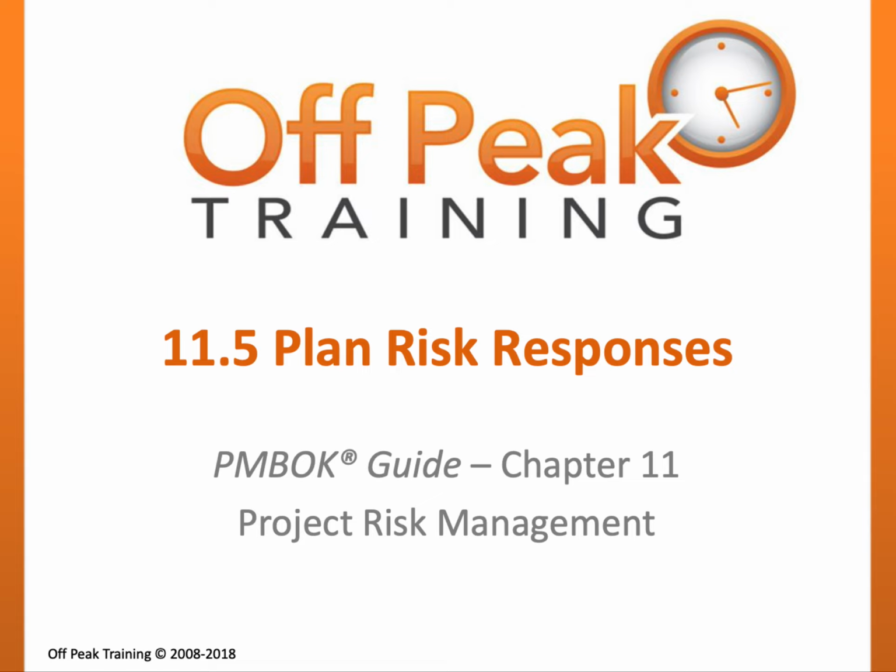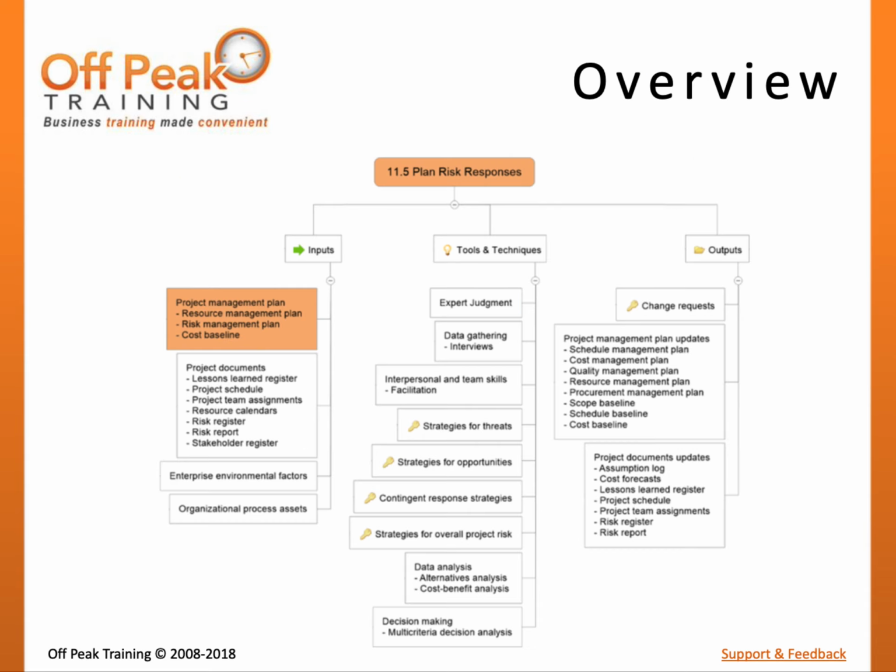In this module, we will learn the inputs, tools, techniques, and outputs of the Plan Risk Responses process. Plan Risk Responses is the process of developing strategies that can minimize the negative effects of threats and maximize the positive effects of opportunities to the project. Response strategies should be developed and implemented in a timely and cost-effective manner. While this process should not typically be performed until after risk analysis processes have been performed, it should be performed iteratively from then on.